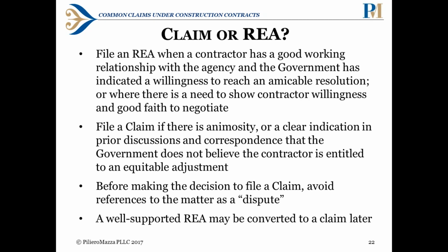Before making the decision to file a claim, you want to avoid references to the matter as a dispute. That is because there is a line in being able to recover attorney's fees, consultant fees, etc. in preparing your submission. If you're in a dispute, those costs are not recoverable. If you're not in a dispute, then it's considered more of a matter of contract administration, and you can recover